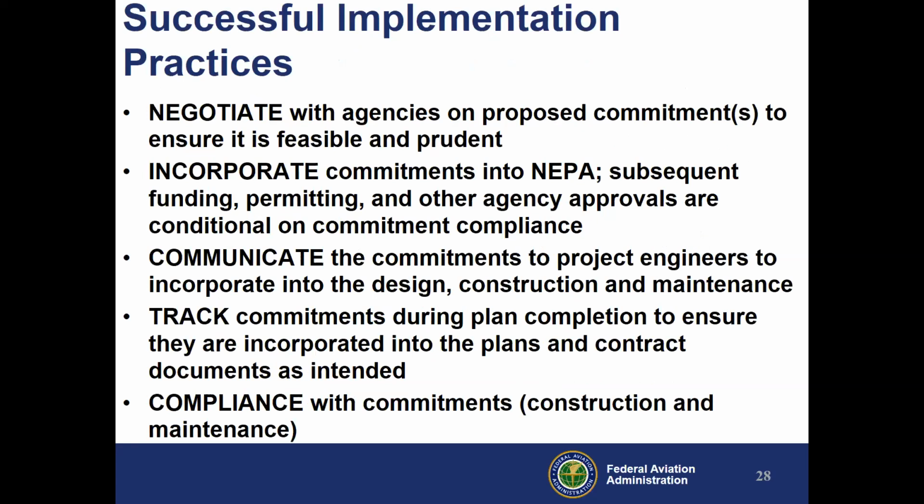Some of the successful implementation practices: negotiate with the agencies on commitments. Ensure it's feasible and prudent. There may be cases where the commitment is not practicable. And so we'll get involved in working with the resource agencies and talk about what might not work and why, and try and develop something that's amenable to the agency that accomplishes their goals as well as ours.